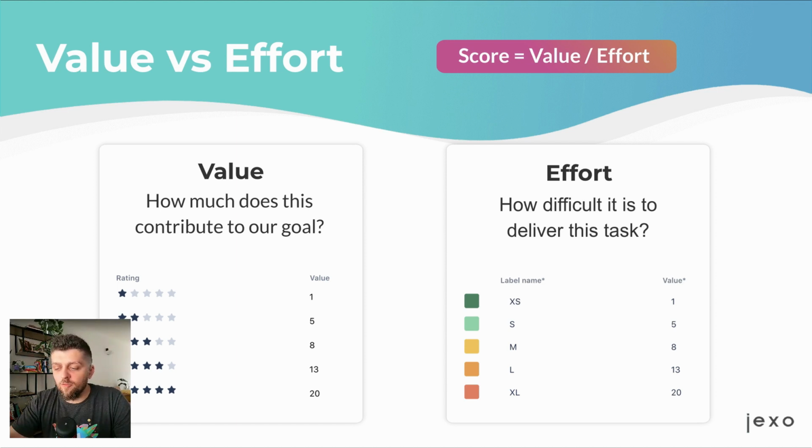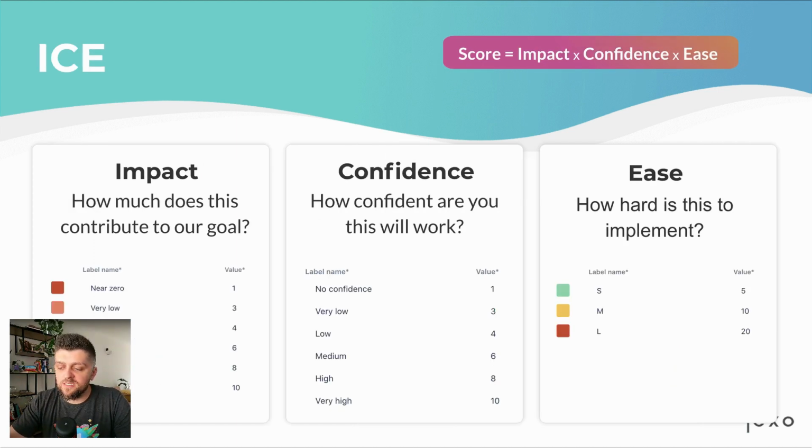So you say effort, t-shirt size, and in this example, it's still effort based. How easy or how hard it is to achieve this. And we have an ease metric, factor values, which is small, medium, large. We used a simplified t-shirt size this time. And again, we have the values 5, 10, 20.